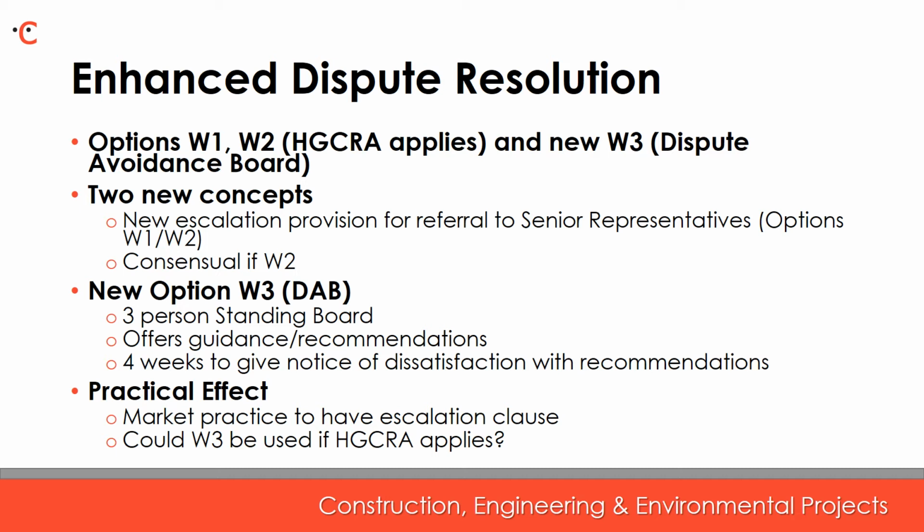The NEC4 dispute resolution service contract is not restricted simply to the appointment of an adjudicator. The contract will address other forms of dispute resolution outside of adjudication and try to reflect the range of dispute avoidance and resolution mechanisms which major projects worldwide tend to take advantage of. So, for example, the procedures allow for and provide for a 4-week period of escalating and negotiating disputes before moving into formal proceedings is allowed.